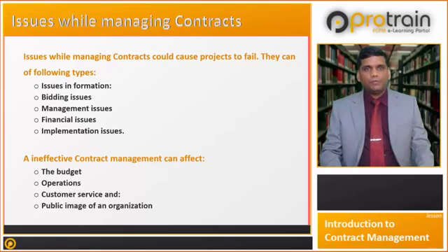Let us talk about financial issues. There may be delays in releasing of payments and delays in submitting performance guarantee and advance payment guarantee. Payment schedules may not be linked properly to the physical progress. This leads to front-loaded payments and the tendency to delay execution of the rest of activities once the bulk of the contract has been paid. Therefore, all the payment schedule should be properly linked to the physical progress.